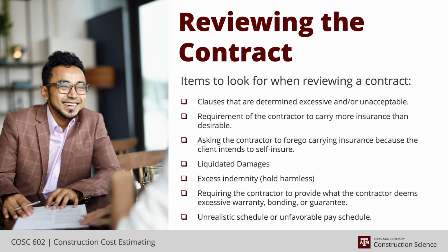And they almost always don't cover anything outside of the plant. So if you have craft leaving the plant to drive down the road to pick up materials at an off-site laydown yard, or you send someone out to go buy materials, a buyer of some kind, and there's an accident, that will not be covered by the OSIP. So both of those aspects are something that we're looking for in there.